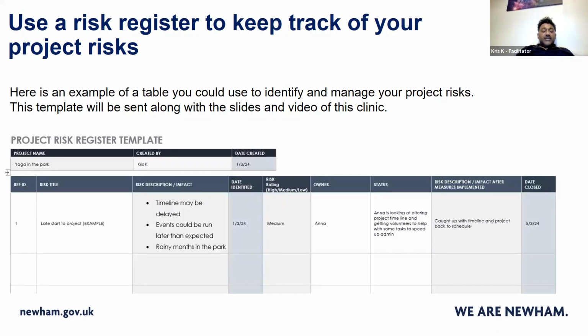I think this is a medium risk. I mean, again, it's up to you how you score that. It just depends how much attention you want to give it. Obviously, if you put it high, those are the things you should be focusing on resolving first. Who is the owner? So, in our group of residents, I'm going to give this to Anna to manage. So, assign each risk to a particular person. I mean, if you're the only person, then it'll be you.